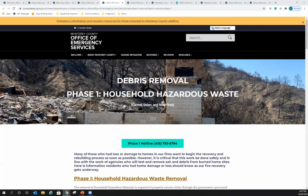Hi, this is Joshua Bowling again. So typically a building permit, we are at 4 to 5 weeks when a building permit comes in prior to a staff person looking at it and reviewing it and issuing corrections. As the fire rebuild victim, that application is going to go to the top of the line. So as it comes in, then it'll go in a bucket with all the rebuild applications, and we'll look at those first prior to the other ones. Thank you. You're welcome.